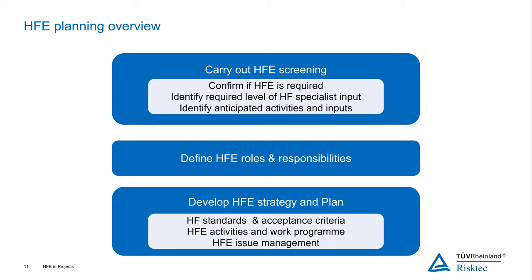The first is that up front, you're going to have to carry out some sort of screening activity to work out which HFE activities you need to do, if you need to do any, and what that looks like in terms of the level of input and the sort of activities you may need. You'll need to define what roles you're going to need on the project. Who's going to need to be in place and what are their responsibilities going to be? And then from that, you'll need to develop a clear strategy and plan that will help you understand what activities you're going to do and how you're going to determine that you're meeting the requirements you've set.